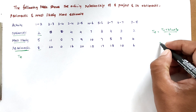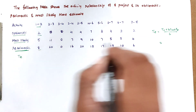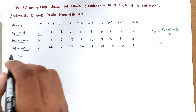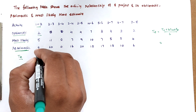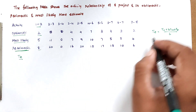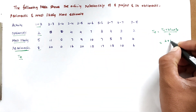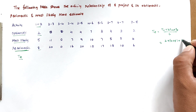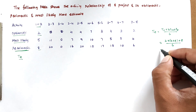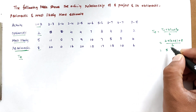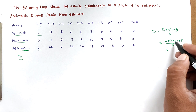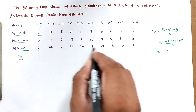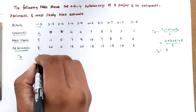For activity 1-2, we calculate the estimated time TE. In PERT, there are three time estimates which we convert into a single estimated time. Taking TO = 2, TM = 5, TP = 8: TE = (2 + 4×5 + 8) / 6 = (2 + 20 + 8) / 6 = 30 / 6 = 5. So the TE for activity 1-2 is 5.